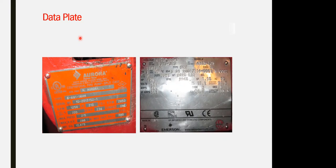Not only this, you also take the factory acceptance test for the pump itself. It has to be tested in the factory, and the factory report has to be attached within your submission. And the site acceptance test as well, which we call the acceptance test on site. You have to submit all 3 documents together. All of them have to show identically the data sheet, the nameplates, and the details of the pump, with the serial number of the pump shown in the factory test and in your submission for the civil defense inspection.